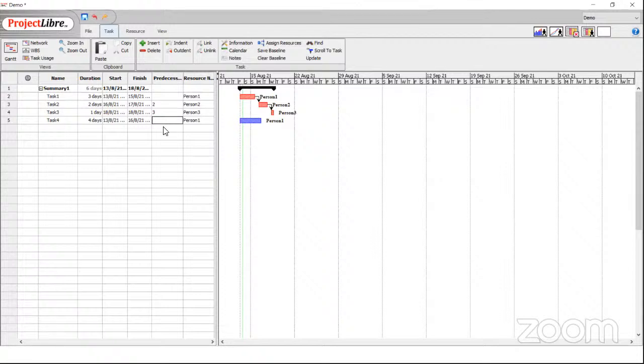Let us add task four to the critical path as well. So how do you do that? It depends on task three, which means task number four. You add that and the whole chain now has become critical, right? So 3 plus 2 plus 1 plus 4 is the total time, each one following the other, four tasks in sequence. And that's how life works, right? You typically have something that has to be finished before the next one can begin.